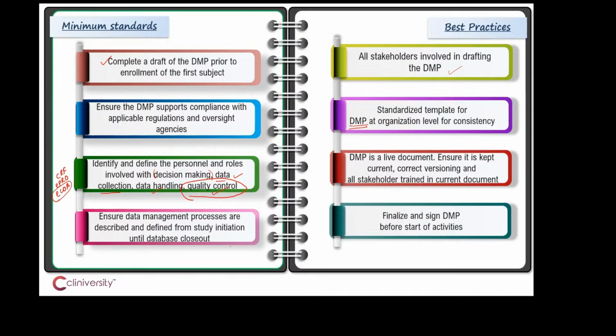And more or less, the list of activities will remain the same for any kind of interventional study, or phase 2 to phase 3 studies. So since the activities are more or less the same across the organization and across different protocols, it makes more sense for the organization to first create one standard template centrally so that the study teams can adopt these templates very quickly and just make those very study specific, protocol specific customizations.